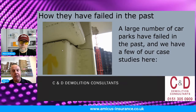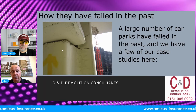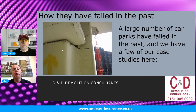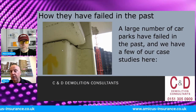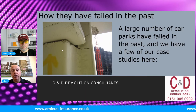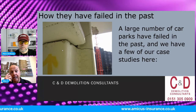And we'll talk about the Elvenite and the South End car park collapse a little bit later on. We were actually brought in as engineers straight after it. Well, John Woodward was brought in, and we had to redesign the system for how that car park came down. But there was no design. The tender went out. No demolition knowledge was passed on. No demolition consultancy was used at the time. I think we now need to understand the client needs to be educated a little bit.